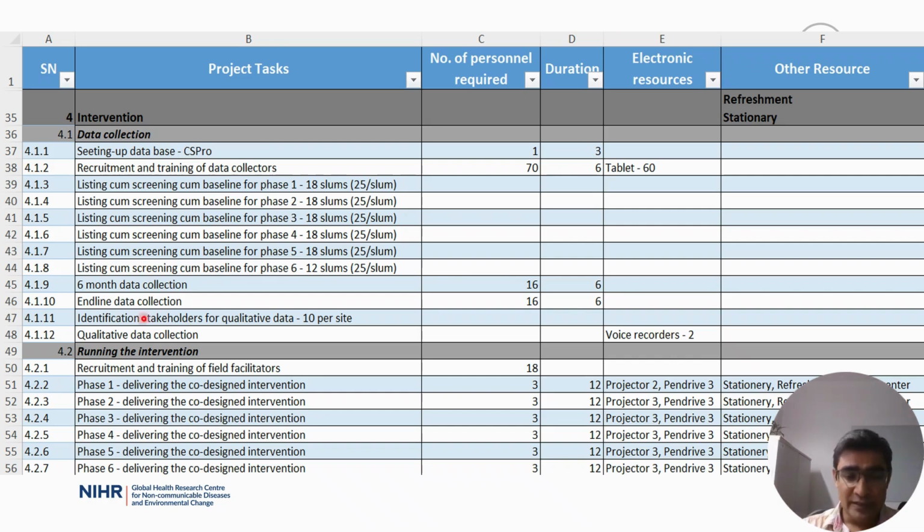These examples clearly show what happens when we do not base a resource estimate on actual subtasks. Often during proposal writing, numbers are guessed rather than calculated. That is why we end up with either too few or too many people. If you are doing a community trial for the first time, it's crucial to consult with teams who have done similar trials. Their insights can help you arrive at a realistic and practical number.